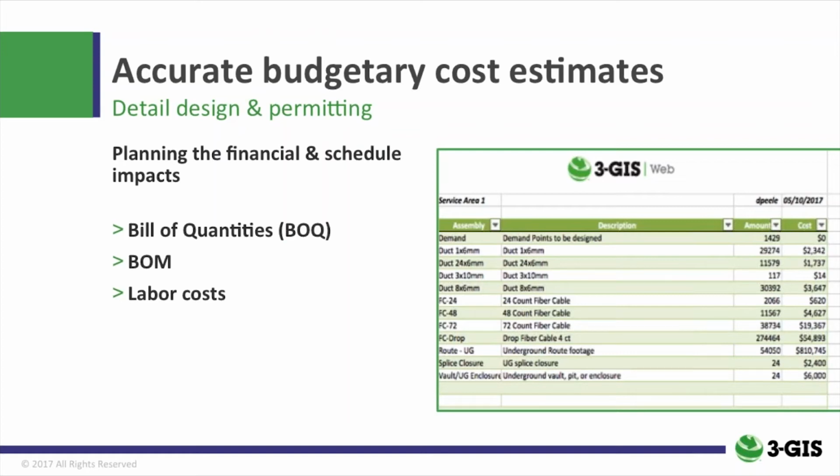And I think a lot of you would agree, the other piece of this puzzle is it gets you ahead of the procurement phase that so often hampers the build. You don't want to be in the back of the line when you're trying to order all of the network equipment that you need.